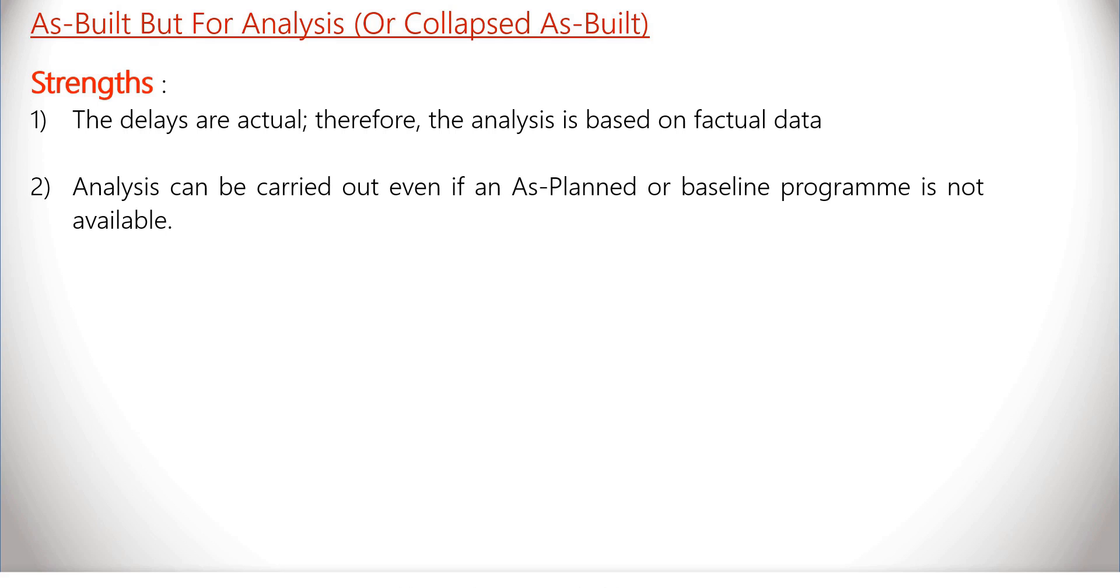Second, the analysis can be carried out even if an as-planned or baseline program is not available.